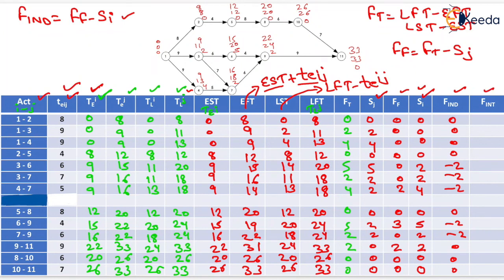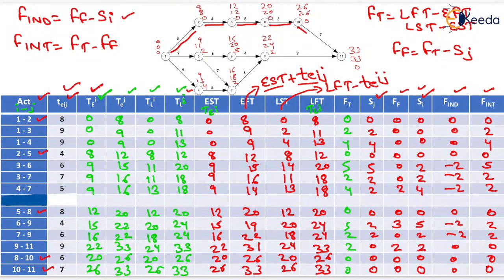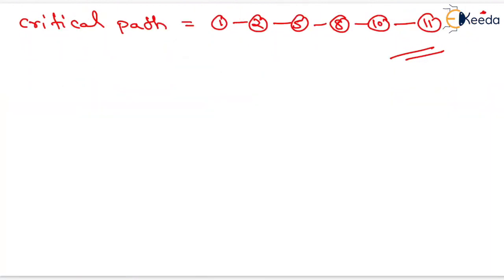For interfering float, we subtract free float from total float. The interfering float values are: 0, 2, 4, 0, 5, 2, 2, 0, 0, 0. Activities with total float equal to 0 are the critical activities: 1-2, 2-5, 5-8, 8-10, and 10-11. Therefore, the critical path is 1 → 2 → 5 → 8 → 10 → 11. Thank you very much, students.